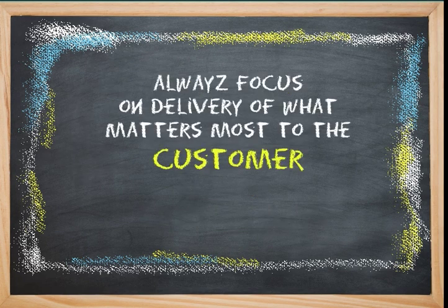Another rule of thumb is if a project takes longer than expected to complete, hey, it happens. In order to control cost, your team must focus on the most critical feature development that matters most to the customer, and I mean customer with a capital C. If you need to release, even without all the features implemented, at least you prioritize completed the features that represent those must-have items that users expect.